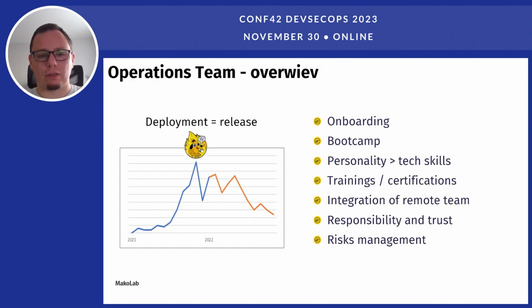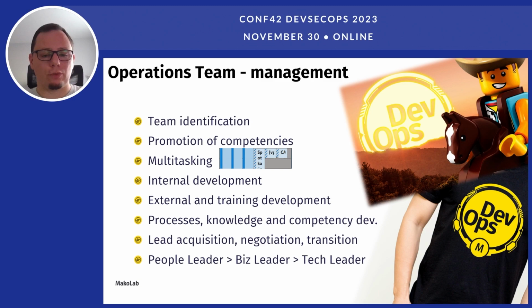What is not obvious but also very important, risk management. So from the very beginning, this is also the culture of Macolab, of having strong risk management processes. I was identifying and managing the risks, which I can say that 20% of the risks are connected with people, 50% were connected with quality, and 30% with the customer or the competencies that at that time we didn't have in the team. So this process is quite critical for delivering the high quality and being able to scale up very quickly.